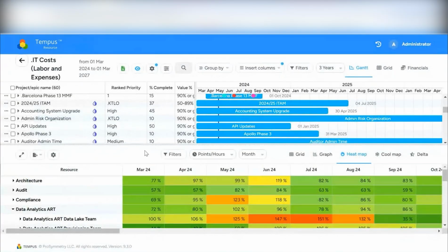And so, on an ongoing basis, what you want to be providing is information that's useful to help adapt quickly. So I say, look, you should be providing status just like you normally do. What's your percentage complete? Are you keeping up with your value indicators? Meaning that, look, you're halfway through the development effort. You've put your minimum marketable feature out there, and it turned out to be a misfire, right? You're only getting 30% of the value you thought you should, right? That's important to know, because if I've got work to push and I'm only seeing 30% of the value come out of that, I should consider that, right? Frankly, either stopping it or certainly putting it out as a candidate for delay, so to speak.